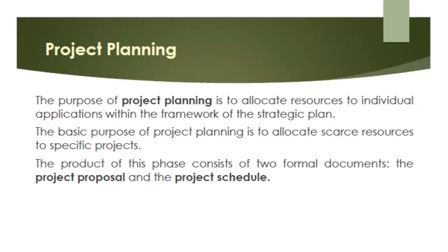Now, your project schedule represents management's commitment to the project. So, the project schedule is a budget of the time and cost for all the phases of the SDLC. So, the project proposal and your project schedule go hand in hand. So, what is seen in your proposal is placed into a schedule.